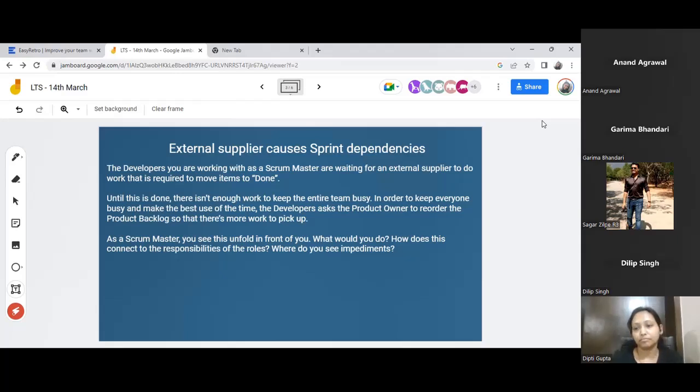If it is obsolete, then maybe it's because of some external factors coming from stakeholders and decided by the product owner. So obviously, the sprint should definitely stop. Yeah, but as per what I understood, this current sprint is obsolete then, because we are not adding increment or value, and it's just an impediment. So probably we have to replan and strategize for the user stories which are getting blocked. Probably we need to raise an impediment, reprioritize the product backlog, and start a new sprint altogether.